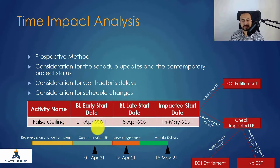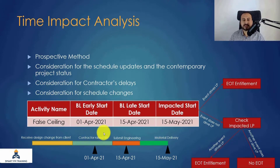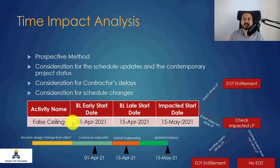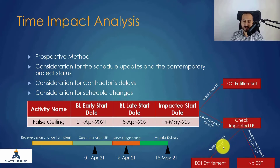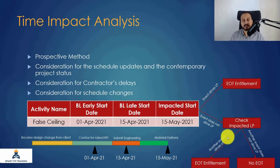Perhaps the event related to MEP is driving the longest path. So I have negative float from the false ceiling event, but it is not driving the project completion — the MEP event is. After inserting the event and checking the impacted longest path, if another event is driving the longest path, there is still EOT entitlement — because in this case the impact comes from the MEP event.